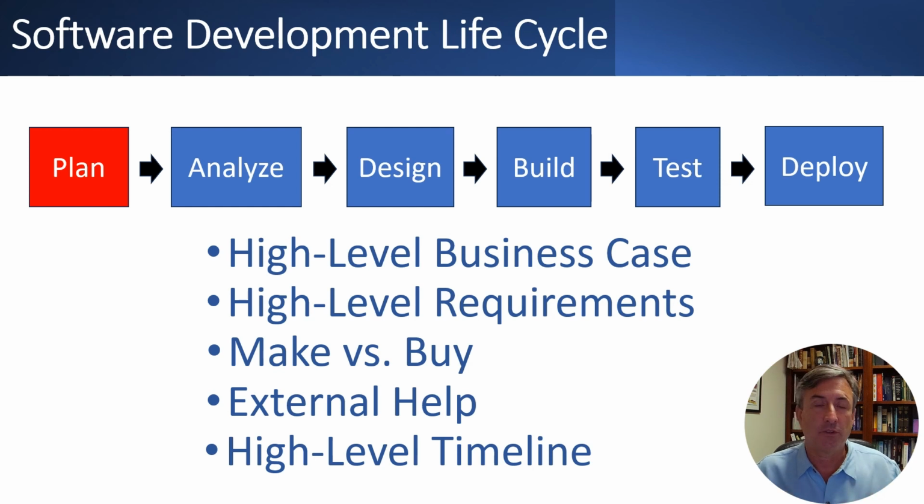And then we usually have a stage gate meeting where we go to these sponsors and the steering committee and say, yes, we've done some back of the envelope. We think this is how much it's going to cost, how long it's going to take, and we think it's worth it. Can we go ahead and spin up a full real project team to do the detailed analysis work and continue on into the project?